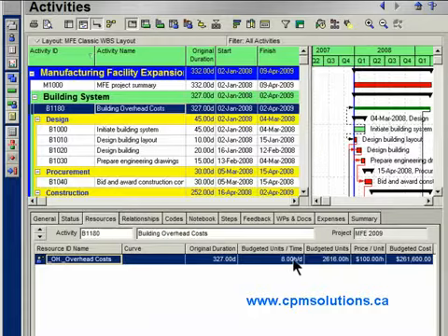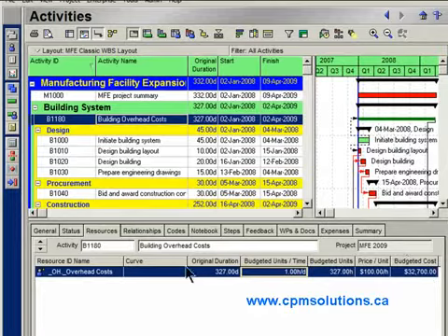Assign it in there. Now, notice the rate is $100, and so I'm going to assume that for 1 hour, for every day, my overhead costs are $100 for all of my crew. I know it's a small number in reality, but over the course of the 327 days, that really gives me $32,000 in overhead costs.